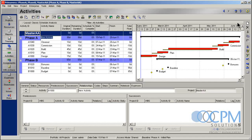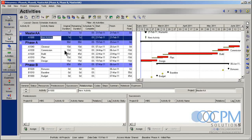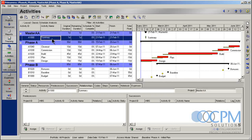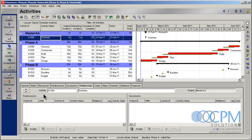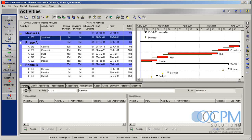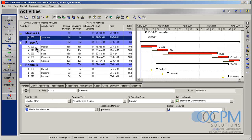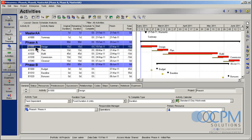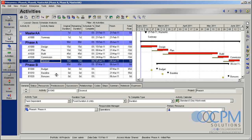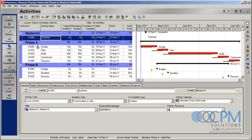I'm going to create a new activity for it. I'm going to call it the summary activity. Summary activity. Now, if you're not familiar with this activity type called the level of effort, this is a great time to go and check out some of the other tutorials we've created, especially the one about level of effort activities. This is a great time to use a level of effort. I want this activity to basically summarize all of design all the way down to close out, including the bonuses and whatnot. So what I'll do is I'll create a level of effort activity.